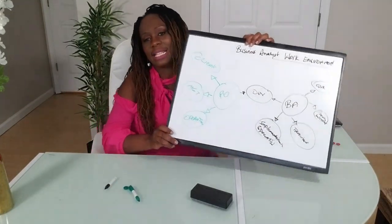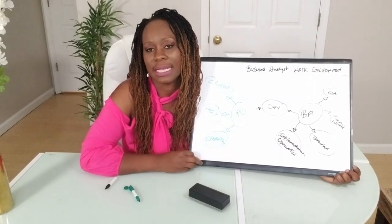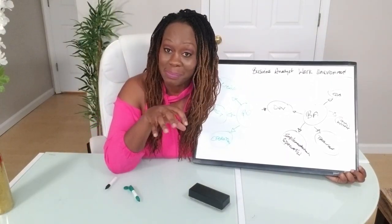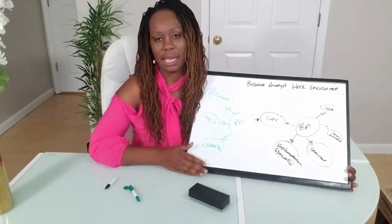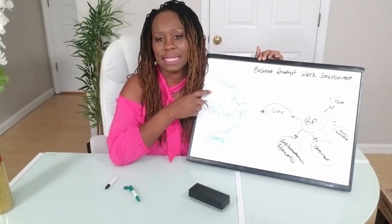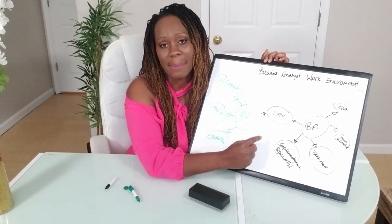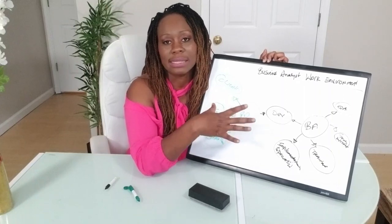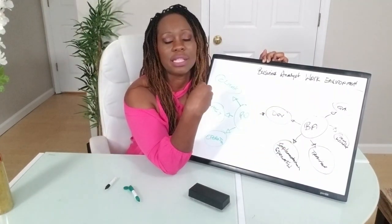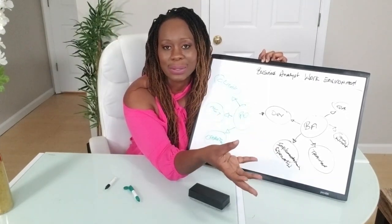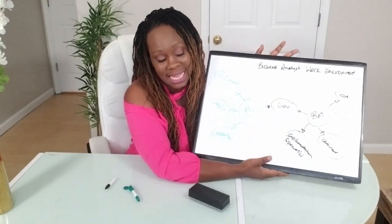When you have both a BA and a PO, the BA tends to be more in the weeds — covering minor details — while the PO looks at the higher-level strategic picture, ensuring the work meets the business goals and managing the backlog priorities. Once the PO has organized and prioritized the backlog, the BA ensures developers have the right answers, that acceptance criteria are written properly, and then works with QA, technical writers, trainers, and implementation specialists to complete the rollout.